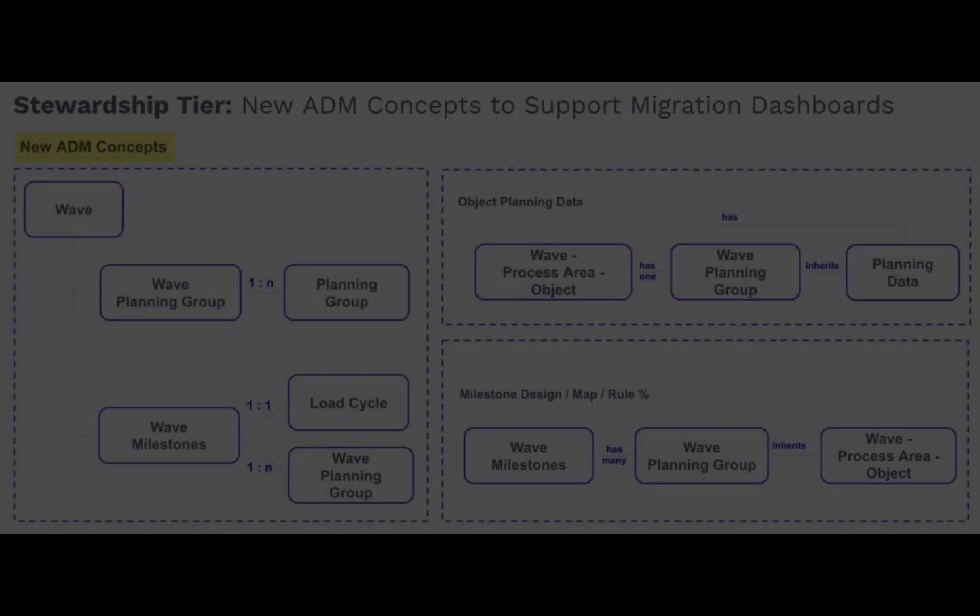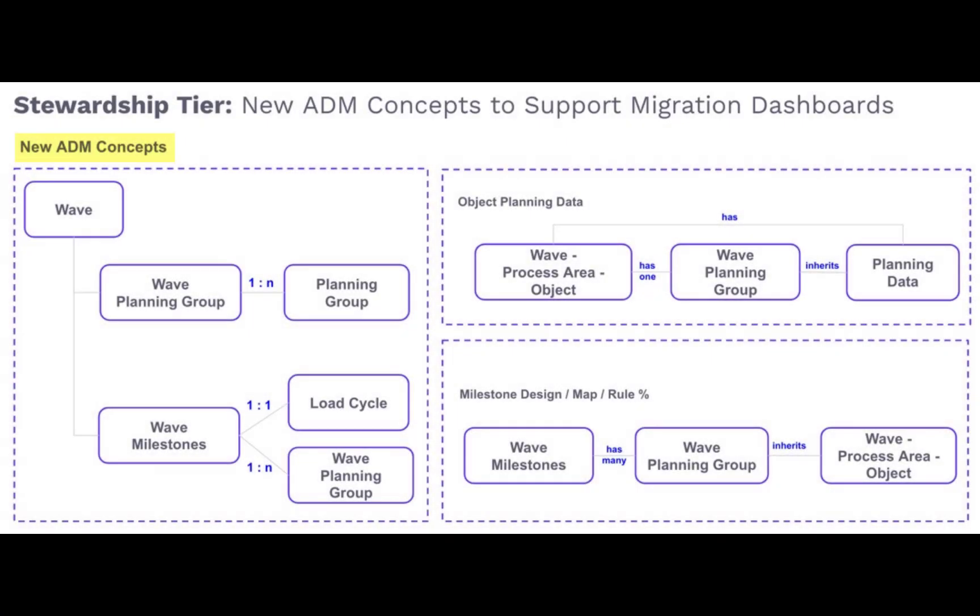The third new concept is Milestones. Milestones are used to create project goals related to the design, mapping, and build of the migration solution based upon specific dates. Through the assignment of planning groups, the objects associated with a specific milestone can be defined.